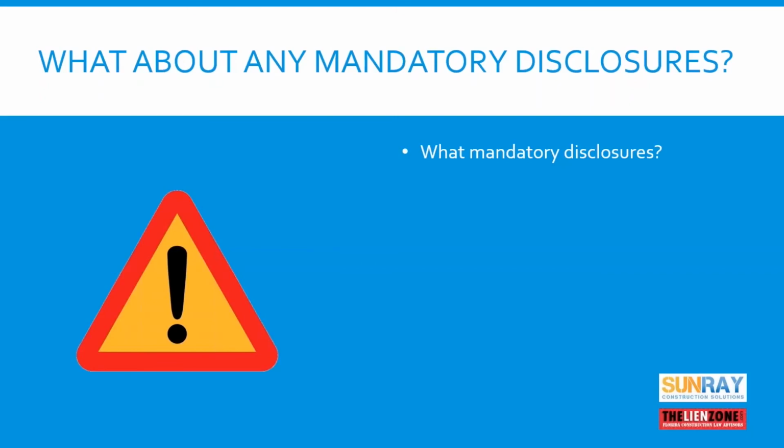So if you're doing residential construction, these are certain disclosures that you need to have in writing, which means that you should have a written contract that includes all of the terms we talked about before, plus these, in order to have a valid and enforceable contract. So the first is the right of rescission. To the extent you provide any sales at someone's home, there's generally, in most jurisdictions, a law of a 3-day right of rescission. So if you sell something effectively door to door, but you consummate the sale in someone's house, you may be obligated to give them a 3-day right of rescission.